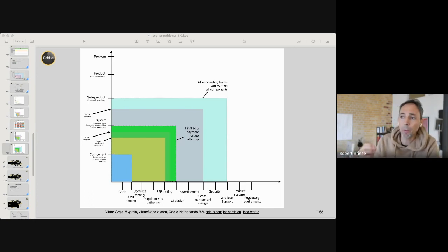And I think the key point here is, like Victor said in the beginning, there's always a scale. And I sometimes say in my course that if your feature is to move the button from left to right or to make it green, then your typical component team, the interface team, is your feature team, because it will actually do the requested feature by changing that one component.